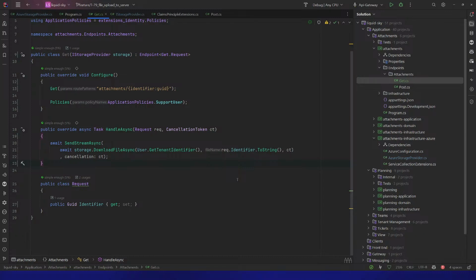Well, again, story points allow you to reason about a timeline. If your timeline is 2 months with a bunch of 13-point tickets, you know you need more investigation spikes, and that 2 months might not be reasonable. Again, based upon 13 points being universally understood as difficult, whereas different teams might actually measure it differently. I took a sprint estimation as the size of the backlog you need groomed.